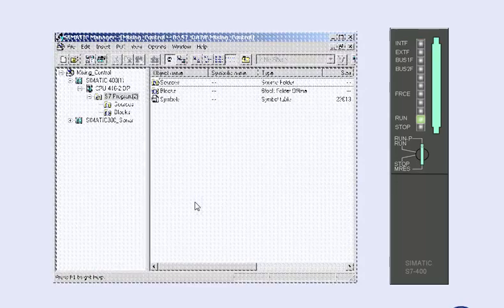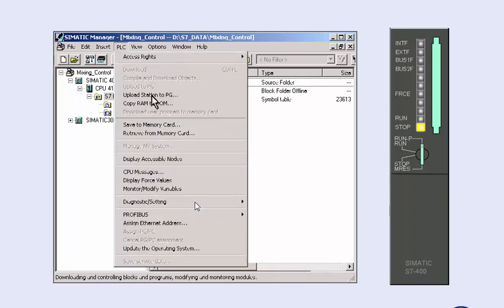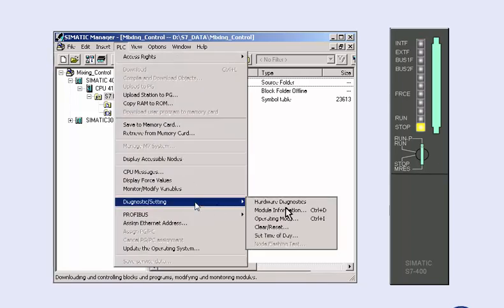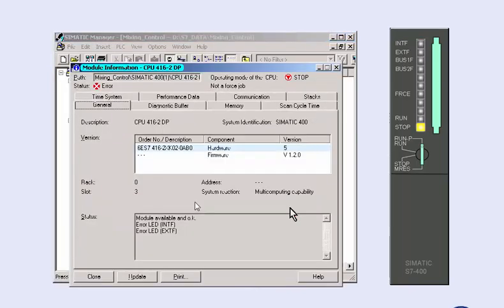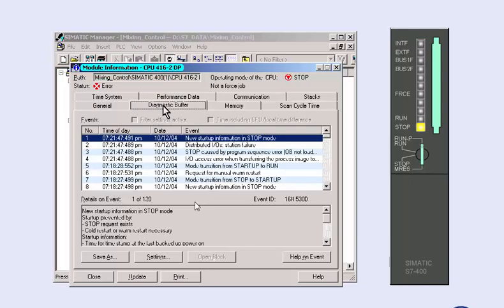If during commissioning, the CPU changes to stop mode, the cause of this will be given to you in the diagnostic buffer, which you access in the SIMATIC Manager via the module information of the CPU. In the displayed information status window of the CPU, you select the diagnostic buffer tab.